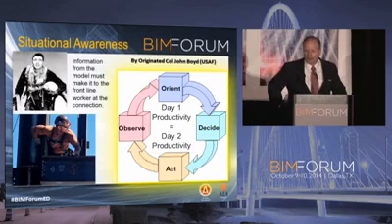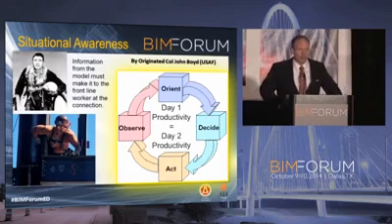There's a north arrow. We had to start making sure that the information written on things was large enough that they could pick it up quick enough, because sight became an issue. We had the center of gravity measured. Since it's on at the factory, we had it measured, put on at the factory, so they don't have to do that. We're cutting down on wasted motion and actions.